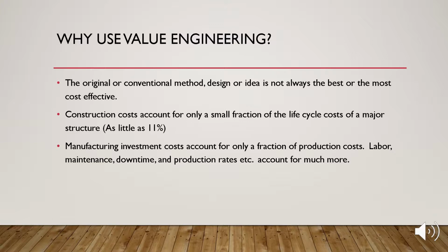Now, it also incorporates lifecycle costs, which sometimes is overlooked when you are developing a project. In construction, sometimes construction costs account for as little as 11% of the life cycle costs of a major structure, such as a building or a bridge. The rest of the costs, the maintenance costs, or the repair costs, can account for much, much larger percentages of the overall life cycle costs. And the same with manufacturing. The manufacturing investment costs account for only a fraction of the production costs. Labor, maintenance, downtime, production rates, electricity, and much, much more account for a larger percentage in many, many cases.